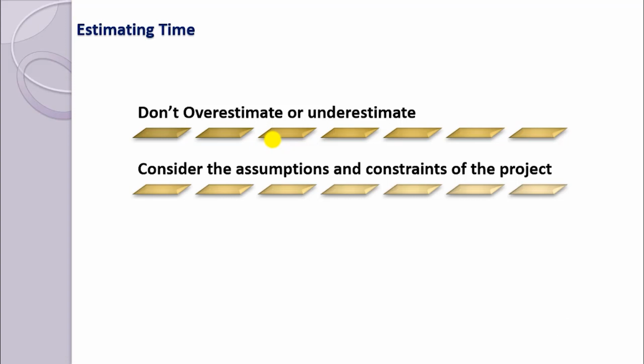In an IT scenario, at the actual execution stage, the team can't work on the previous estimates, which were made at a very high level when you were making a proposal. But in actual execution, there could be n number of changes of requirements from the customer. Those things have to be in the estimation so that your project billing also increases. It is justified. And trust me, if you talk to the client and explain the process and the quality which can get impacted, they will understand. So here the project manager has to handle it through their contacts and negotiation skills. It is as simple as that.